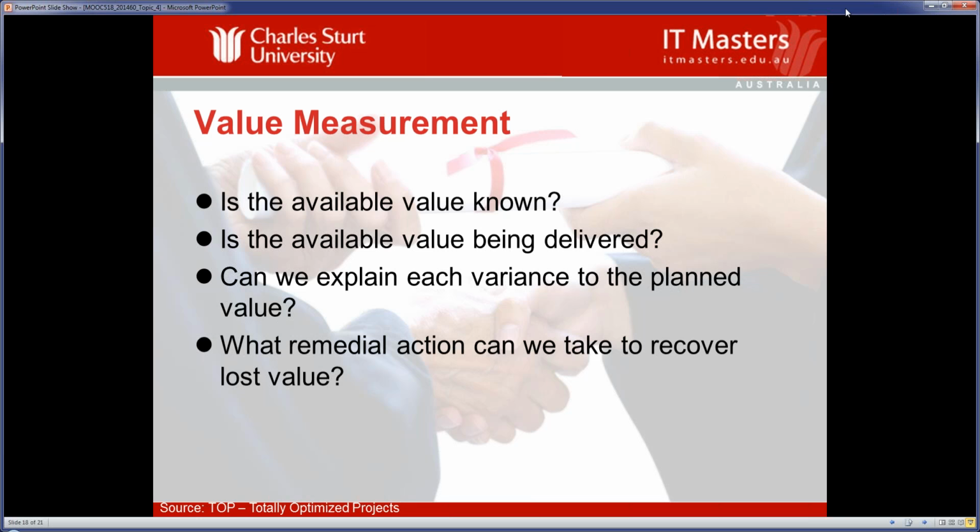And we were talking about have we optimized our benefits and value? Do we know where we are? Are we able to track them and measure them? Now, quite often, the project will have stopped. The project manager or program manager will have moved on to another area at this stage. Part of their closure should be to make sure that it's very clear who's accountable to continually measure this value. Someone that understands the drivers and can report back on it and justify the investment.